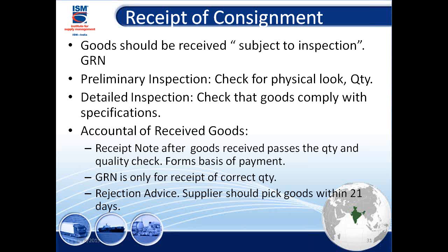Now you're done with this. The next thing comes, obviously, the receipt of goods. Now the receipt of the goods the storekeeper gets, they will just collect the 5 boxes, 10 boxes, they'll say subject to inspection. They give you a goods receipt note, GRN. But the storekeeper has not looked into the quality. Storekeeper has not looked into the quantity. They have only seen 3 boxes. As per the invoice, as per the documentation, there are 4 boxes.